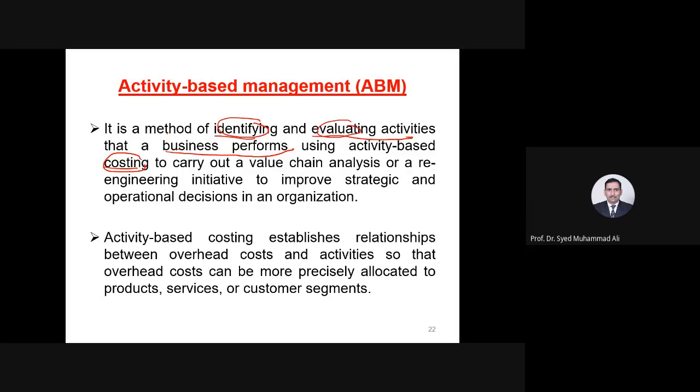You can control nut by nut, bolt by bolt, just like a car engine, and fine tune your activities. So if it is a service industry like you have, I also gave an example, Hassan's surveying company. So if Hassan spends 100 rupees on a project, Hassan knows that out of 100, 60 rupees are spent on, for example, contouring, 20% is spent on plotting, 10% is spent on traveling. I mean, just giving you rough examples.